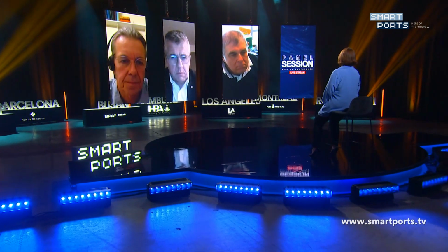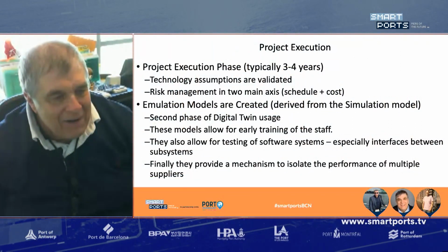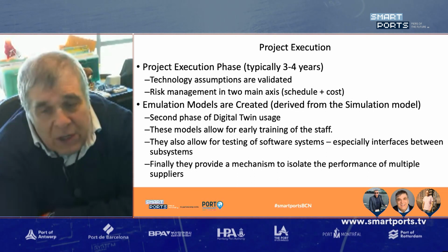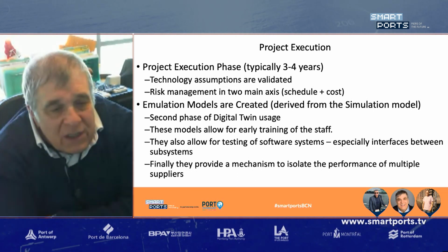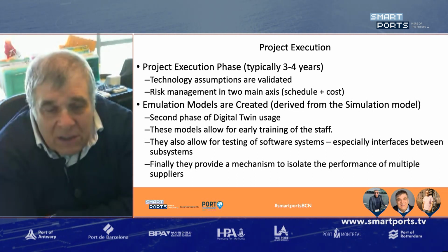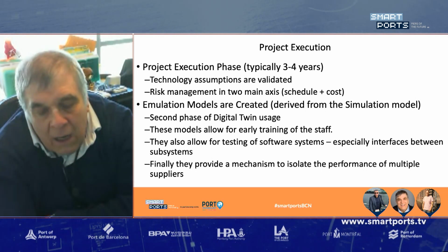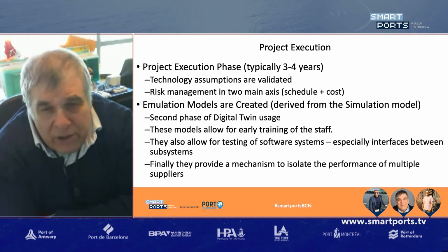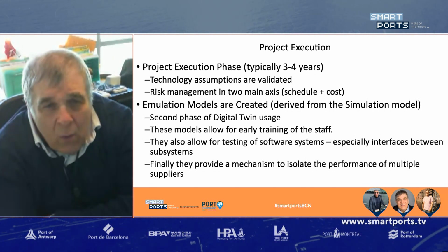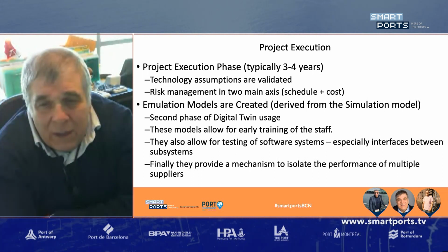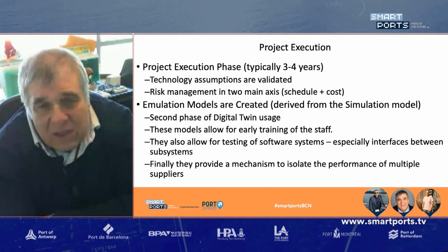They can also be used to do other things like, they allow for training and testing of the software systems. When we first started here in 2007, there were no terminal operating systems that did this. They were all created by people in Hamburg and in Rotterdam from scratch. They were all custom systems. We spent over a year and a half with a digital twin of the terminal, debugging the software that was going to be used to operate it once we turned the systems on.